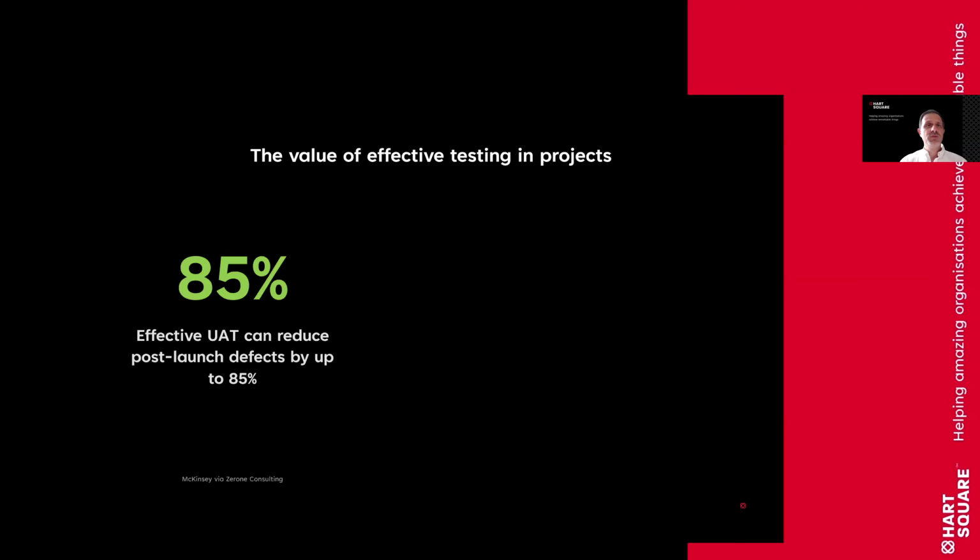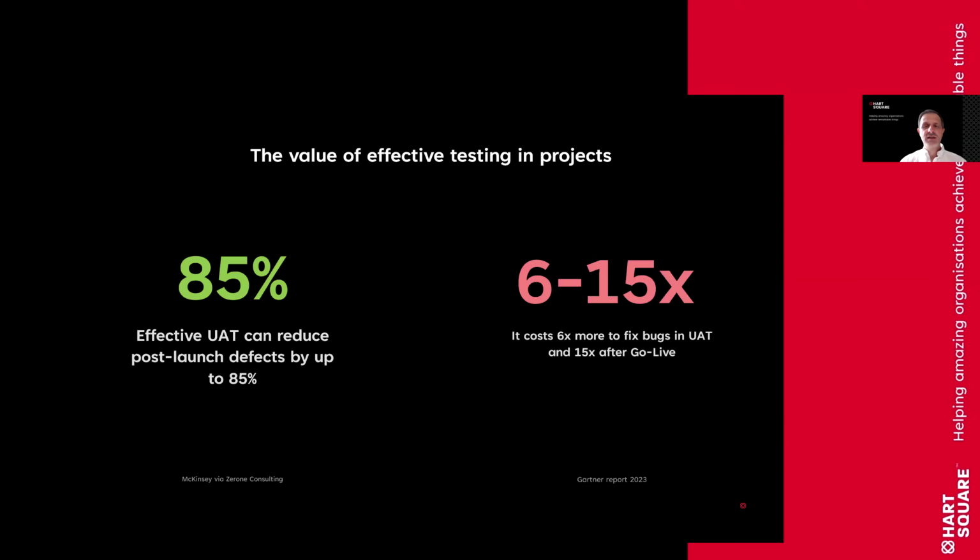In a lot of cases, people would expect that 100% should be achieved. I think the reality of projects these days means that there will always be a small degree of minor things that probably do go live. The important thing is that the critical, high importance member or donor facing journeys are not affected by those bugs, and those should be well addressed within the 85%.